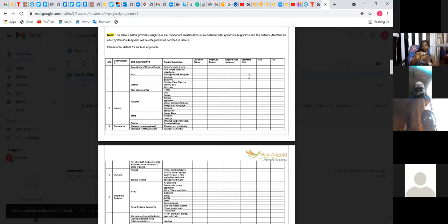So when I'm putting them in my reports, in the gallery section of my report, the picture files will be named according to what I have named it here. So if somebody is looking at this spreadsheet and the person is looking at my report, the person can link, see a picture and say, oh, this is the line item that describes that picture. So if I get you clear, in this spreadsheet it is actually the name of the file that would be placed there, not the picture. Yes. Put the name of the file, the name you saved the picture file as, so that once somebody sees your report, you can connect with the pictures. Okay.